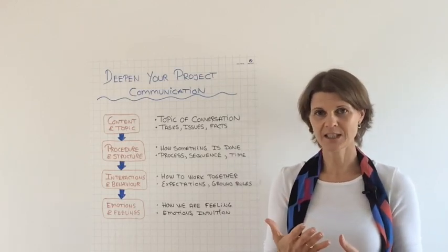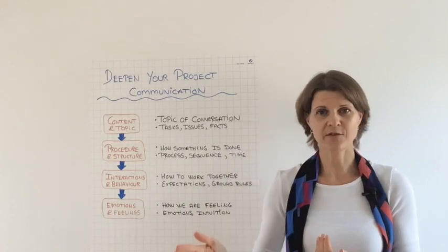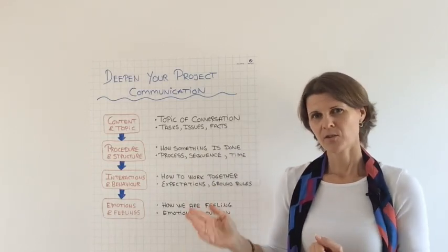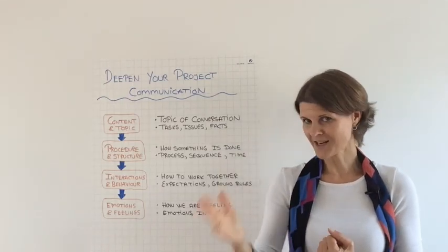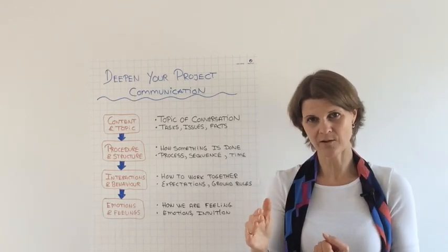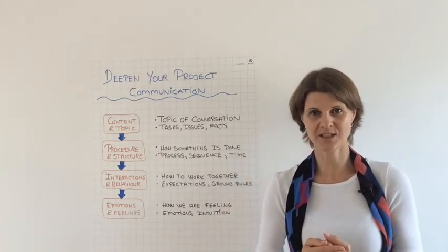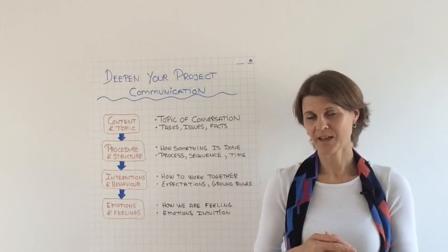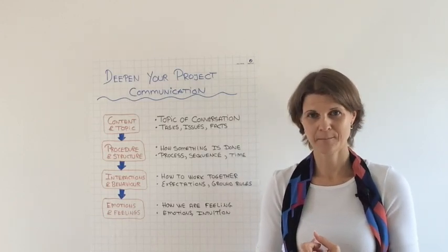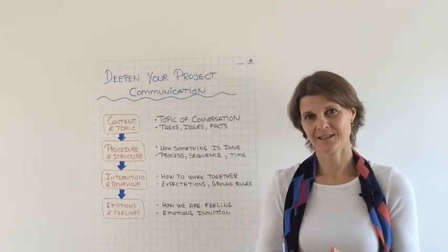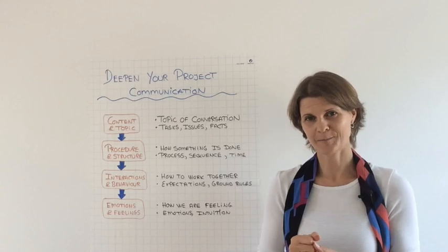We just get upset or angry if a person doesn't show up to a meeting on time, if they don't deliver their work on time, or if they interrupt everybody during a conversation. The ground rules I'm talking about are really behavioral ground rules. So sit down with your team, give them a stack of post-it notes and ask every person to write down for themselves what is important to them on a team. What behaviors would they like to see in a team, and then discuss them together and agree a common set of ground rules. For instance, how are you going to overcome conflict? How are you going to do your meetings? There are so many expectations here that are worthwhile making explicit.